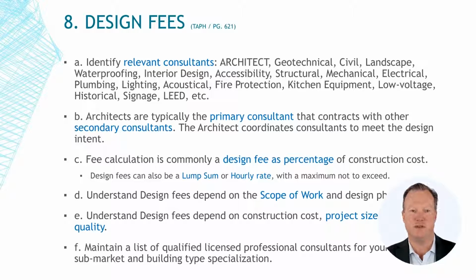C. The fee calculation is commonly a design fee as a percentage of the construction cost. Design fees can also be a lump sum or hourly rate, with a maximum not to exceed. D. Realtors and their clients should understand design fees depend on the scope of work, and not all design phases may be needed. E. Realtors and their clients should understand design fees depend on construction cost, project size, levels of quality, and the construction schedule. F. Maintain a list of qualified licensed professional consultants for your real estate sub-market and building type specialization.